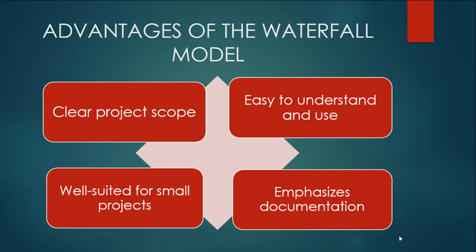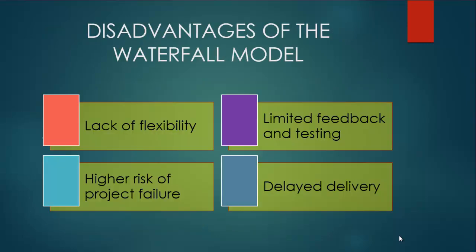Okay, so what are the disadvantages? The disadvantages of the waterfall model include lack of flexibility, it is rigid. Then there's also limited feedback and testing. There is the higher risk of project failure because of its rigidity. Then it can also lead to delayed delivery because a particular phase has to be completed before another phase.